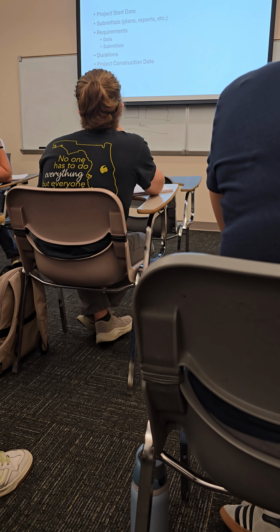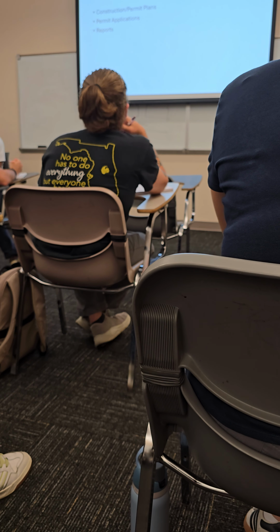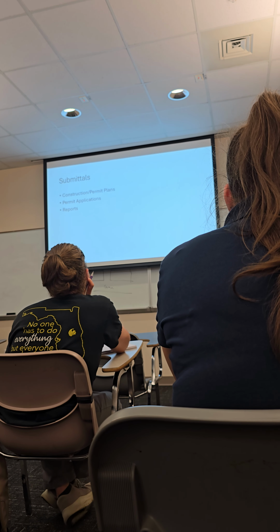So kind of digging in a little bit on submittals. Typically your submittals would be whatever construction documents you're preparing. Okay. And then again, you would have permit applications and then various reports. So sometimes in a project, we're kind of focusing on the water resources pieces, but if you can imagine, development's going to have other pieces and parts too, which you'll get into in the capstone class. But for example, you may have to do a traffic study. So a traffic study would develop a report, and then that report might get submitted to an agency for review, just to solidify your traffic numbers and so forth.